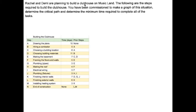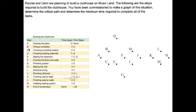The final part. Rachel and Demi are planning to build a clubhouse on Musicland. You have been commissioned to make a graph of this situation, determine the critical path, and determine the minimum time required to complete all of the tasks. I'm going to start with A. A goes to B — B has A as a prior step. A also goes to C. B goes to D. E has C and D as prerequisites, so I put E here. Then we have F, which has E as a prerequisite — E goes to F. E also goes to G.